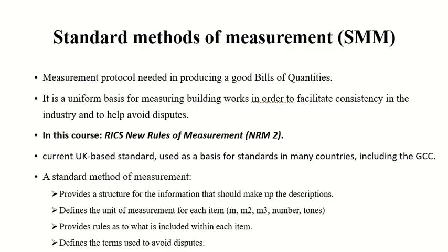Anyways, the point is, there are lots of people involved, and they can be from different backgrounds. I showed you one of the examples: even if you miss one hook length, it can increase the cost by more than 10-12%. So we cannot allow everybody to do this work in their own way. You may start getting quantities of concrete in square meters because somebody thinks the slab has a constant depth, and somebody else may give you an estimation in only depth. We cannot allow this. We need all these people to be on the same page.